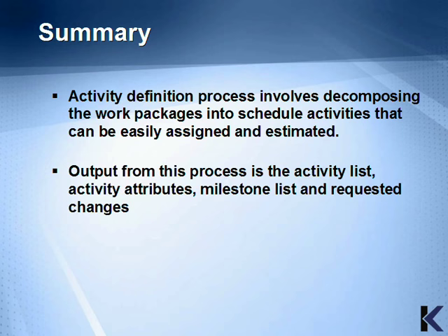The activity definition process involves decomposing the work packages into schedule activities that can be easily managed and estimated. Output from this process is the activity list, activity attributes, the milestone list, and requested changes.